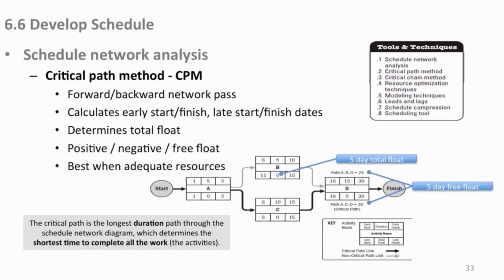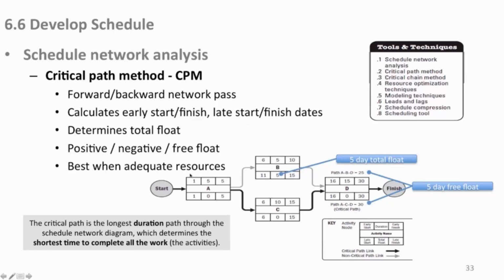Now this is one of the scheduling methodologies you could use, and that is the critical path method. There's also critical chain, and there could be others, but this is the one primarily used in most shops. The way you calculate critical path is you start here and go through here. You can see here's your template, early start, early finish, with a duration. Here are our durations in the middle that we've estimated each task will take, task A. So it goes through B to here, and you finish over here, and then you go backwards for the ones down here, which are your late start and late finish. You do it down here. And there's a method to the madness in the way you calculate this.